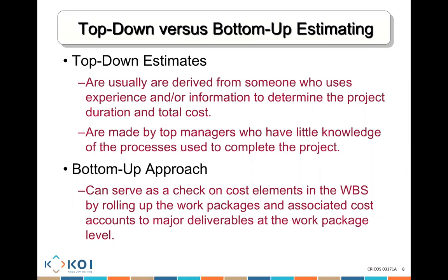Don't tell me, build a house and give me that estimate. No, tell me, what am I going to be doing in the house? Okay, I'm going to sort the garden section A. I'm going to paint the house. You need to be very specific. Okay, and for painting the house, what are we going to be doing? Okay, you have to estimate that. So you're going to go to the very detail, and you're going to estimate the detail.